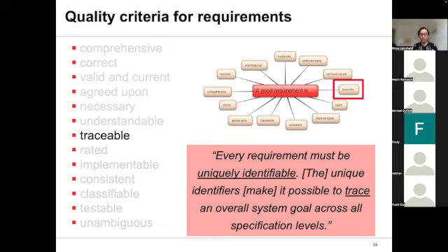sometimes you work on projects which are quite large scale, and you're going to gather hundreds of requirements. For you to follow them through the end of the entire process framework, you need to attach a unique ID to them, right? So you put a clear ID and you trace it through the entire process. And not just you in your role as a business analyst, this unique ID is going to be carried over by the developers as well.